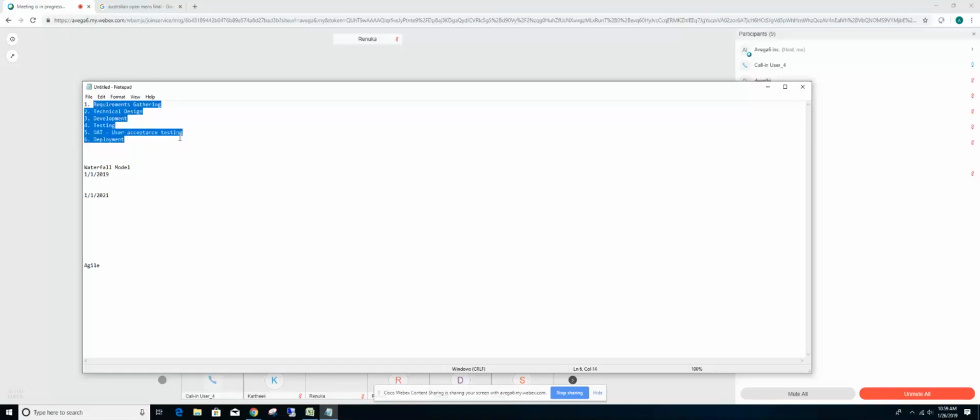They'll go to the development team or the technical architects and ask how long it is. Not an exact estimate, but at least a rough estimate of how long it's going to take to finish the development. They will ask the testing team also how long it's going to take to test it. They will plan some time for UAT.